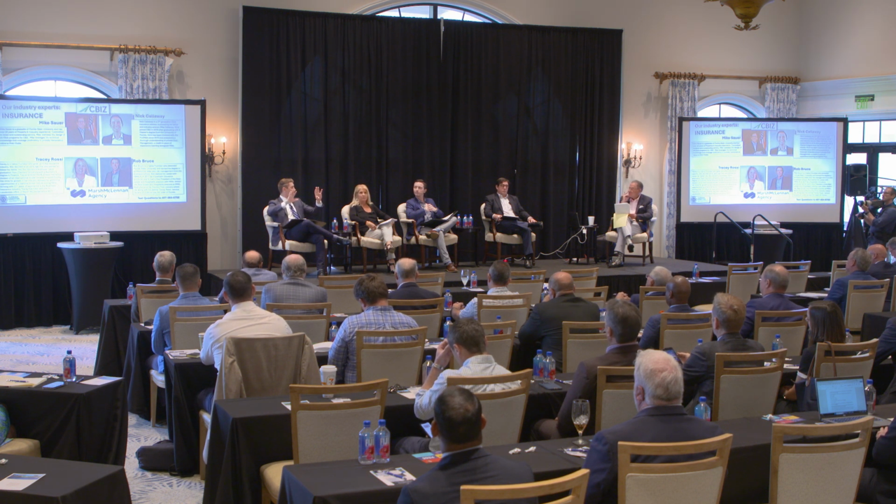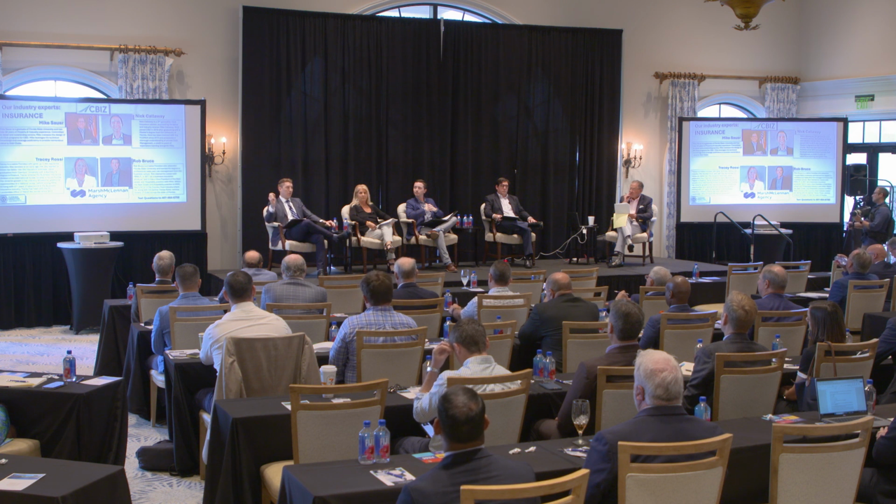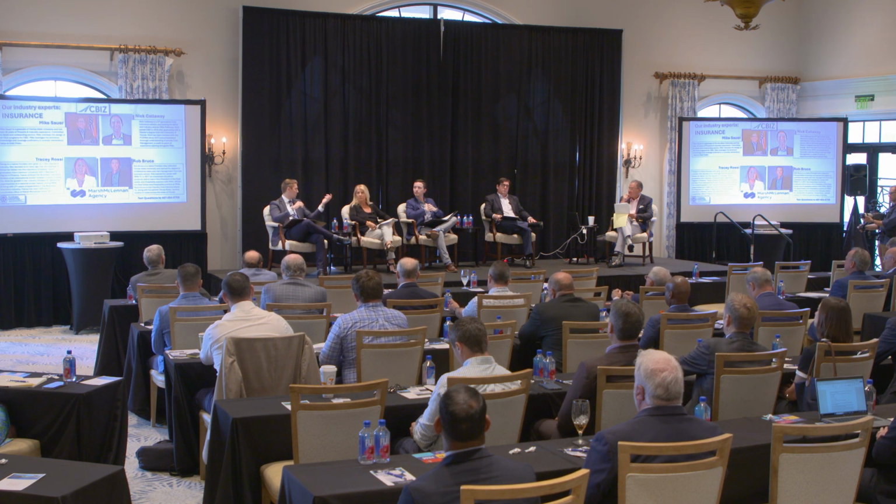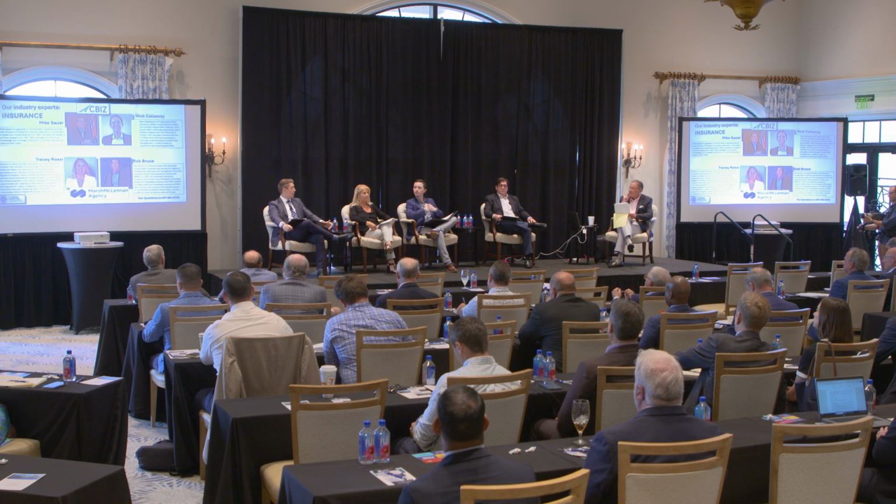Yeah, it's a plaster kind of thing that goes on the outside of the building that just looks good, contemporary and all that. But that'll just be torn right off in a wind event. You might not have any other damage to your building, so not have a claim of some sort, but this EFIS will get torn right off the building, and that's going to be excluded with a lot of carriers over a certain percentage. Now, if it's 10% or something like that, I think that's okay, but if it's over 15, 20%, you're just going to see it scattered all across your property. You're not going to be able to recoup from that.